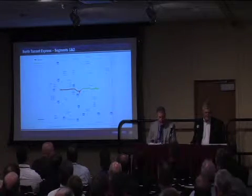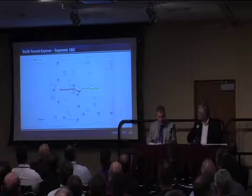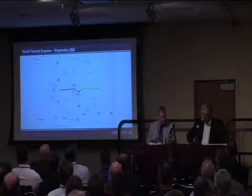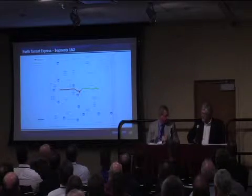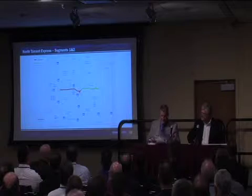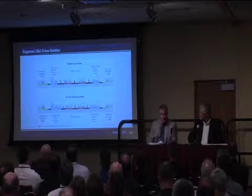Segments 1 and 2 are a 13-mile stretch along 820, 121, 183. Construction began in October 2010 and was complete in October 2014, 9 to 10 months ahead of schedule? Almost 9.5 months. So, and then a cross-section of what got built.